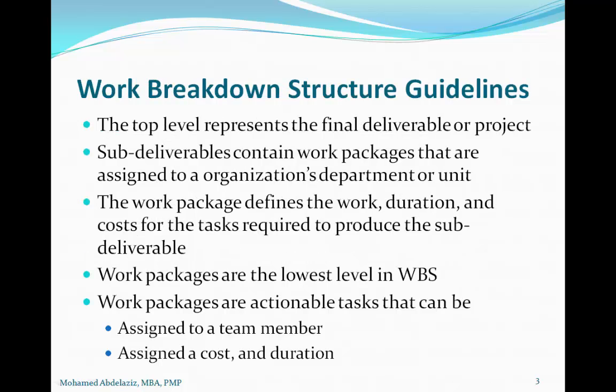To start off, the work breakdown structure guidelines include the following. Sub-deliverables would contain work packages. Work packages are the lowest level in the WBS, and they would typically be actionable tasks that can be assigned to a department or to an individual. You can also estimate cost and duration for each of those work packages.